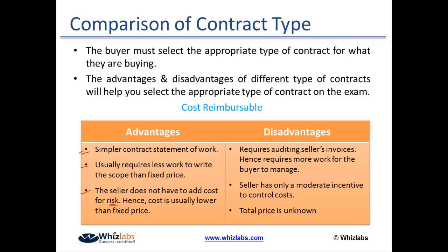But then disadvantages: it requires auditing sellers' invoices, hence requires more work from the buyer to manage. I always need to be careful if the invoices raised by the vendor are appropriate. So I have to look into it very carefully. The seller has very little motivation to control cost, and the total price is unknown.